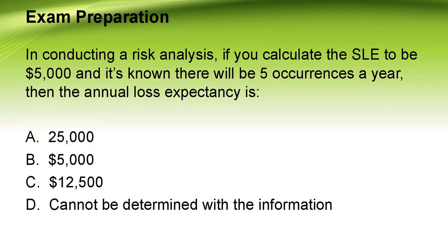In conducting a risk analysis, if you calculate the SLE to be $5,000 and it's known there will be 5 occurrences a year, then the annual loss expectancy is, answer, A, $25,000.